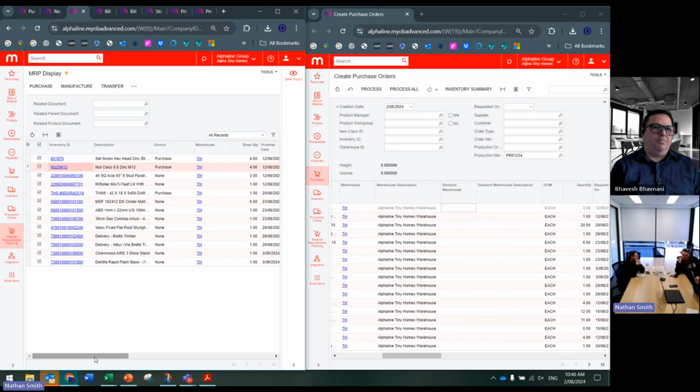And for your priority things, if you wanted to order priority ones, you just search everything upcoming in the next week, and we can order that. We can all do it by your promise dates. And normally your priorities are your 6, 8, 9, 12 week stuff. They're all priority ones, because of the longer lead time. Priority twos are your next sort of 2 weeks. And priority fives are all your bits and pieces.